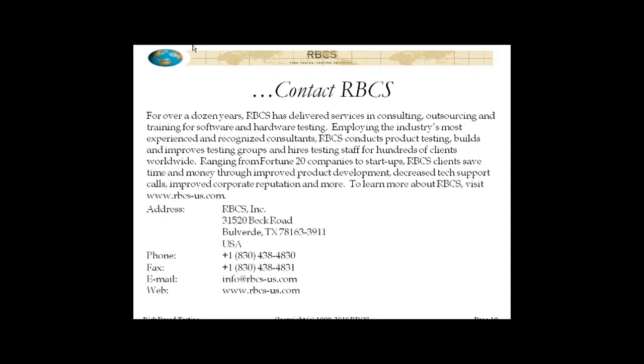So in the case of risk analysis, what's going to be wrong is you're probably going to be missing some risk items, and you're going to have some risk items that are rated incorrectly in terms of likelihood and impact. Now, you need to have something built into your process that allows you to counterbalance this, to counteract this. And this is where the reactive or exploratory testing comes in.